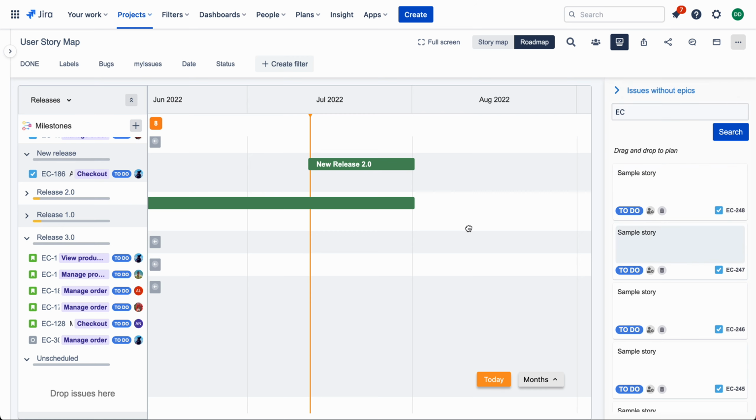And to plan for a ticket, you just drag and drop on the roadmap view to specify the start date and end date. Like this. You can resize the bar to change the date, or right-click on the bar to change the color, clear the plan, or change the start date or end date.